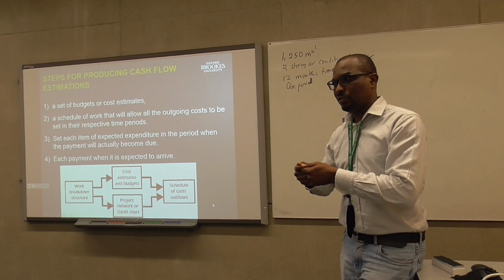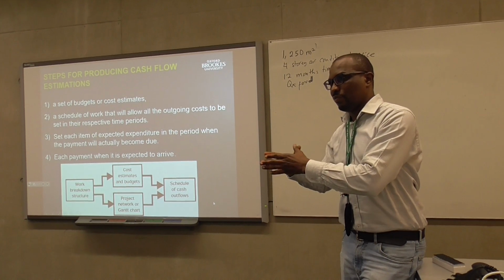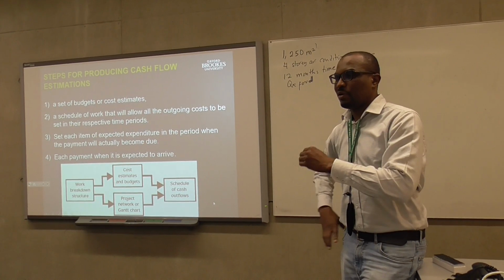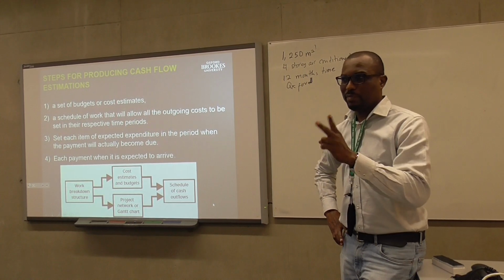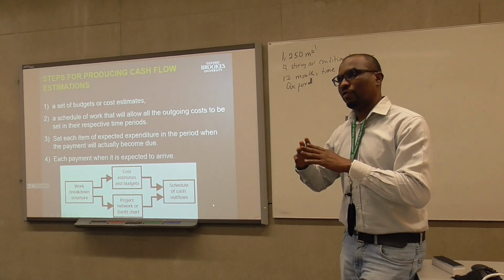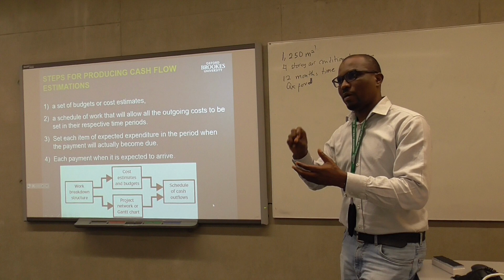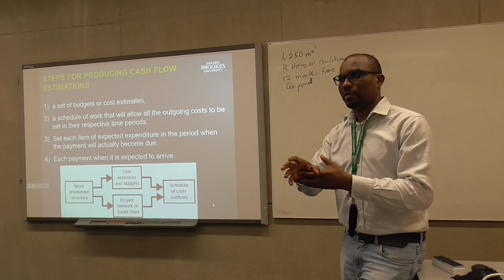You have your project, you have your idea you want to execute. The contractor is there to do the actual project delivery and execution. Partly depending on the contract mechanisms, but generally most contractors tend to be paid monthly because no contractor wants to lock up his or her capital in a project.